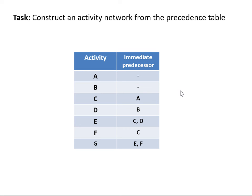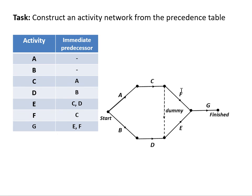How'd you go? Let's have a look at our activity network for this particular precedence table. Well, there we see. A and B are our starting because they've got no immediate predecessors. A and B are drawn in. C has to follow once A is completed, so A is the immediate predecessor for C. D can commence once B is completed, so B is the immediate predecessor for D.